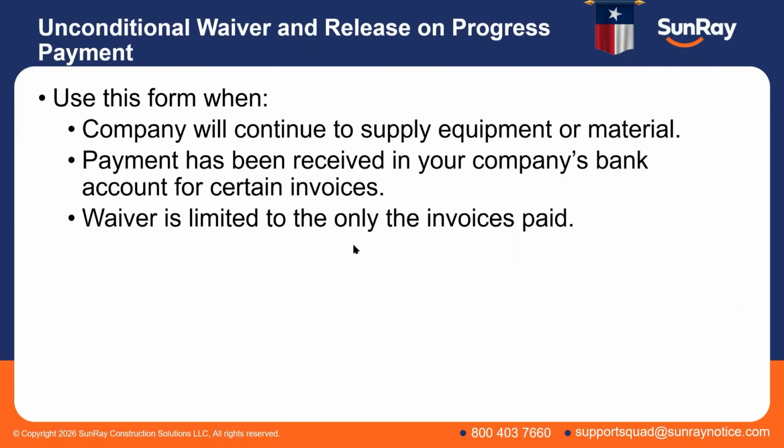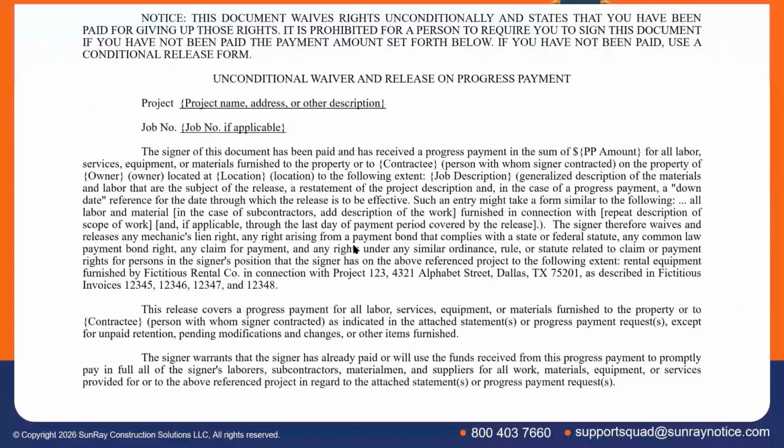Right. So here's, again, this statutory language. This is our statutory form. We just copied and pasted this from the statute. Look at that language in caps at the top. Yes, it's in caps in the statute that says you're not supposed to sign this in exchange for a check. They mean that. That's why it's there. Don't. So this one is not conditional.